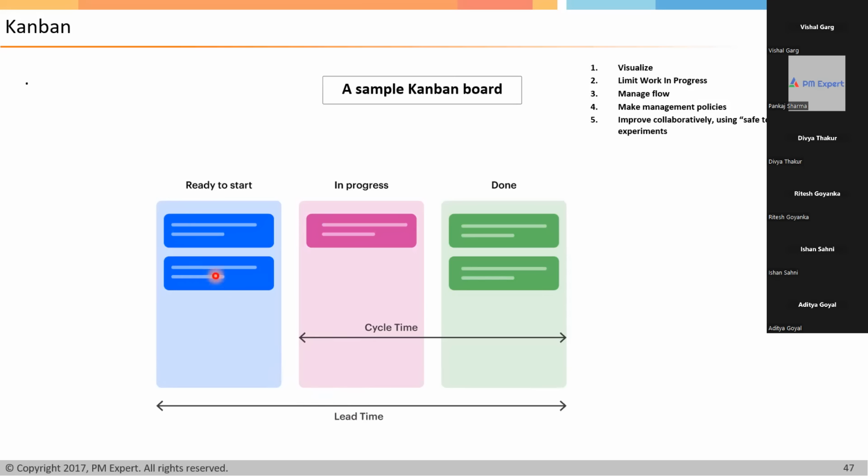When you talk about production systems, the flow of goods starts with the inventory in your warehouse. So the moment inventory enters your warehouse, from that point onwards, you start calculating lead time, right? And inventory might be on hold in the warehouse for some time, then it is moved into in progress for manufacturing. So there's a difference between cycle time and lead time, right?